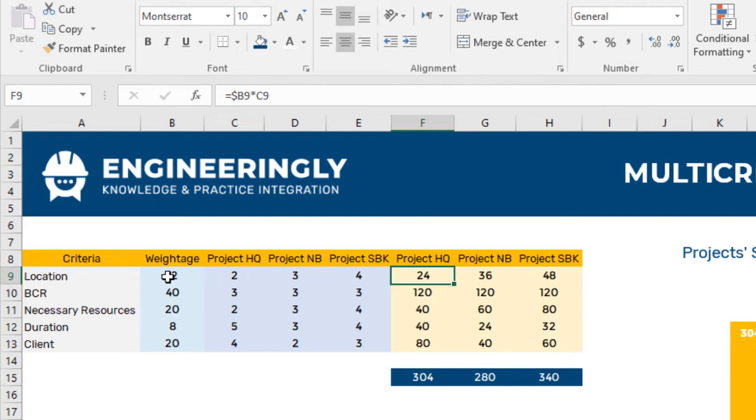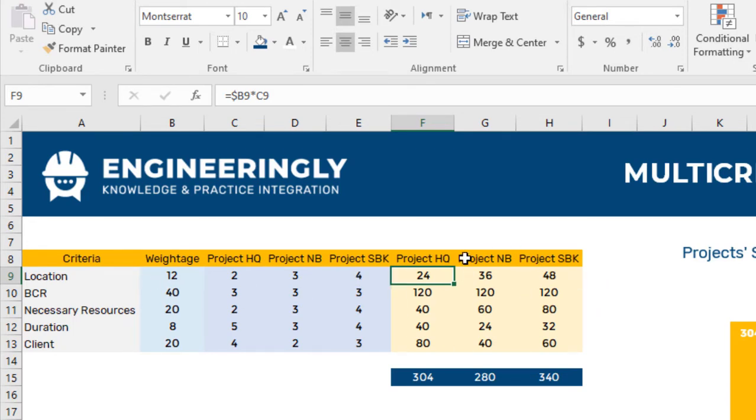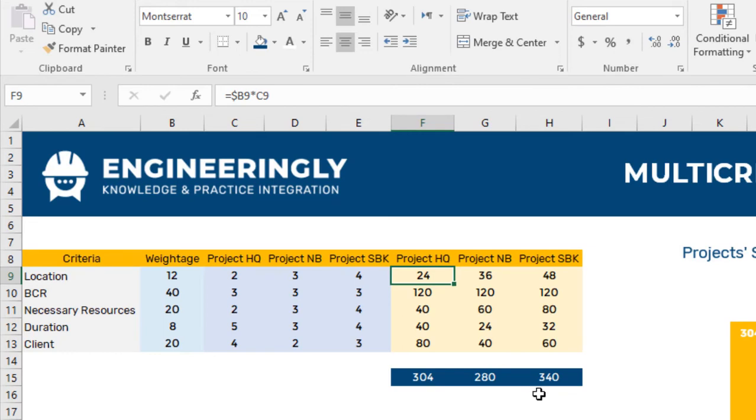For example, 12 times 2 equals 24, 3 times 12 will be 36, 4 times 12 will be 48. These numbers are automatically generated using this formula, and then the total numbers are added.